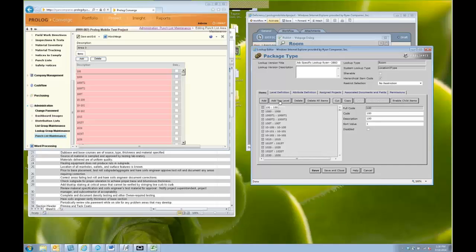So once you have a floor plan or a room schedule, those room numbers aren't really going to be changing all that often. So you don't need to worry about waiting until punch list time. Just go ahead and get them entered in, and then they can use it for punch. Your field teams may also want to use it for deficiencies, so they may want this information entered earlier rather than later, so that they can use the locations for their deficiency list.